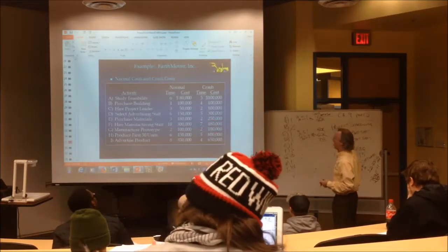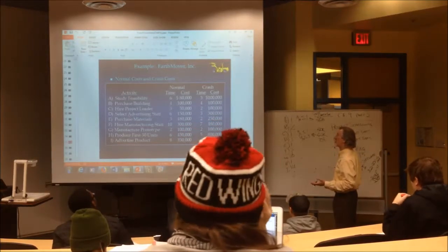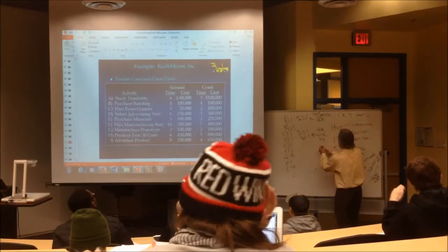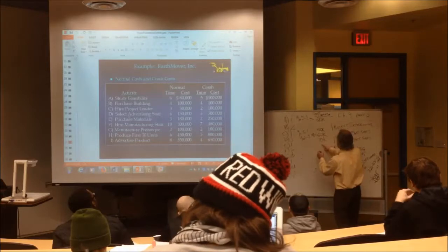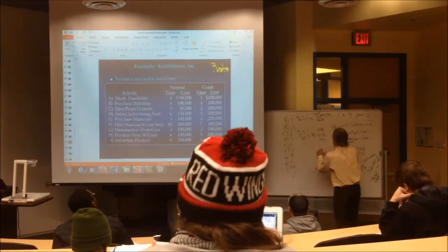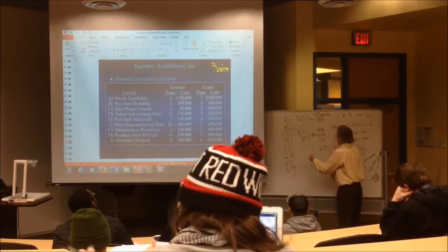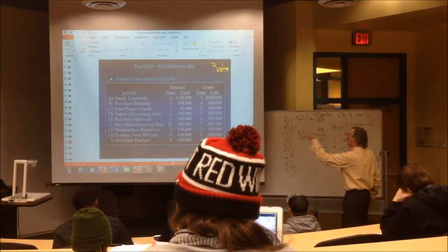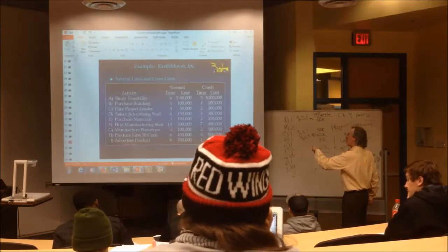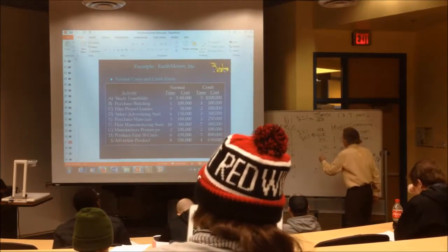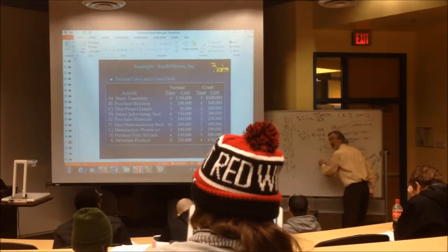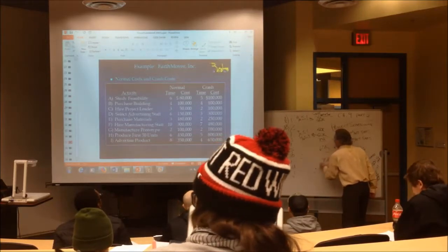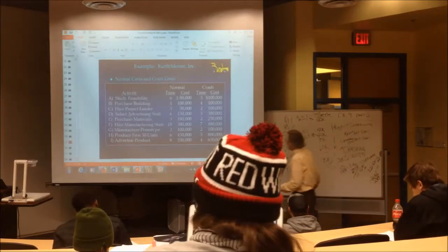Let's go with F. 10 to 7 is 3 units, 300 to 480 is 180, so per unit is how much on F? 60. Did I skip E? Let's see, F is 60, thank you. And we go on, G has nothing, H is 1, let's do I. 350 on I goes to 650, that's 300,000 divided by 4, which is 75,000. And we didn't do H.